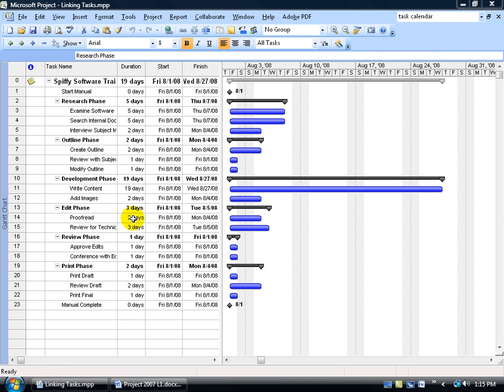Now the purpose of this training video is basically to link your tasks together. But keep in mind, in the background, by default, these tasks, when they're linked, are going to have a relationship type, which is going to be finish to start. We'll cover the relationship types a little bit more. In fact, how to change them once they're defaulted in the next training video. But right now, let's just go ahead and link up our tasks.